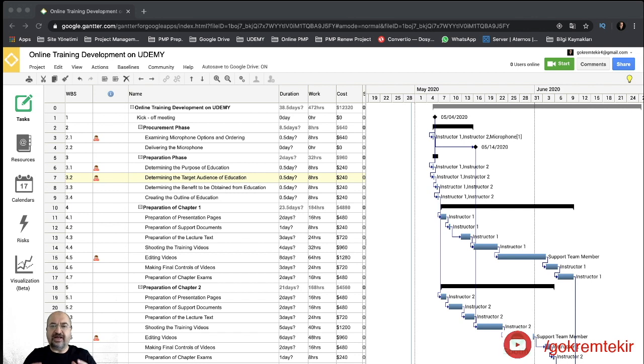After analyzing and completing the plan, you should freeze your project plan. We call it setting the baseline. So executing and controlling processes will start after setting the baseline. A project manager should track planned and actual values, and he must suggest preventive or corrective actions to stakeholders when any variances have occurred. To track project performance, a project manager should know earned value methods.